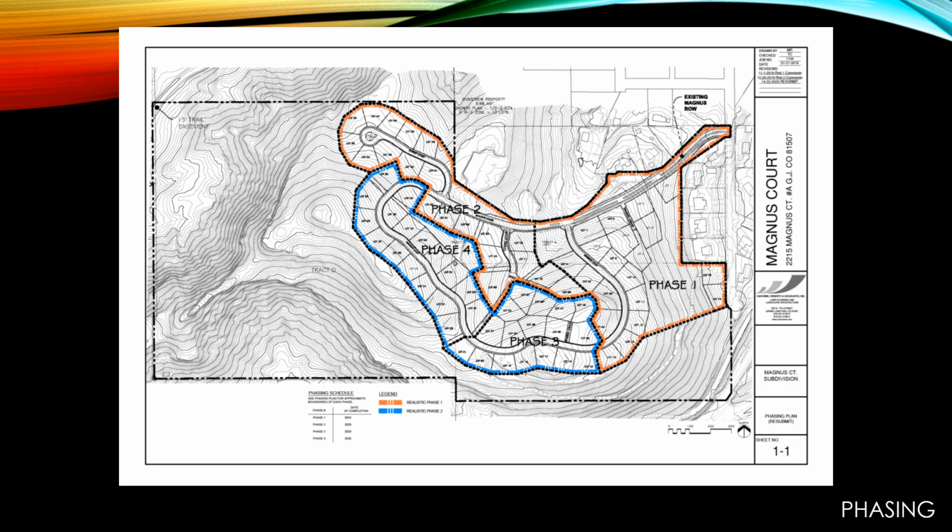And regardless of the number of phases, the big earthwork and big utilities will happen with the first mobilization of the project site. So one takeaway here is that there will not be heavy construction equipment driving to and from the site on a daily basis over a 4-year period, ruining roads and increasing safety issues. There will be a single mobilization for the big earthwork and underground utilities. Understandably, there will be expected traffic associated with small utilities and home construction.